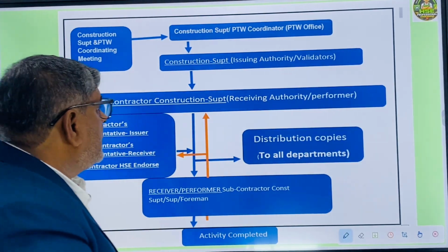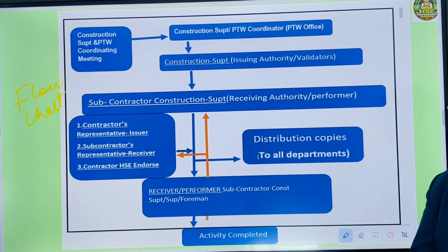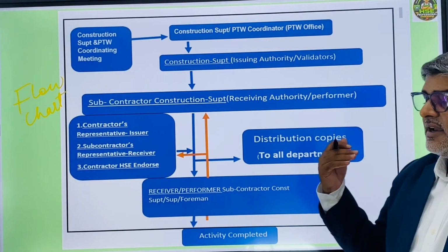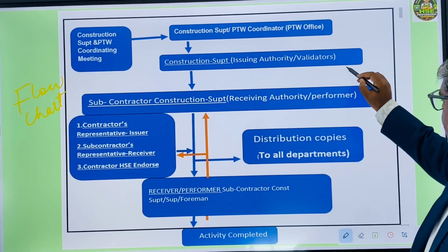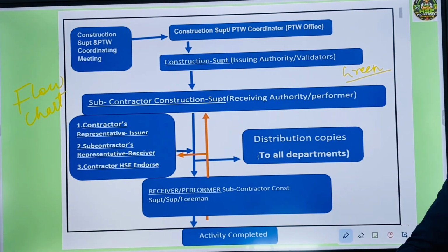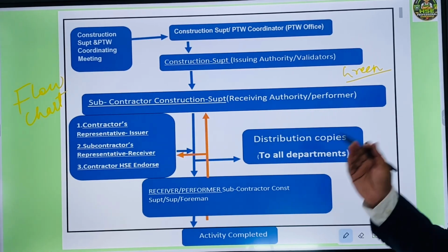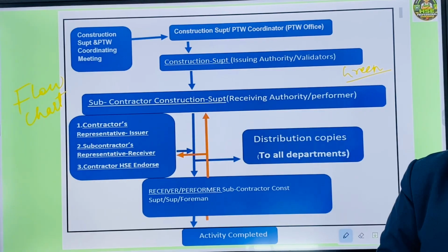You can see here in the contractor part, suppose my company owns a project in Aramco, and we have greenfield especially. There are two fields. In greenfield, the contractor can prepare its own document based on the client document, and that will be approved by the proponent and client to work in his premises.